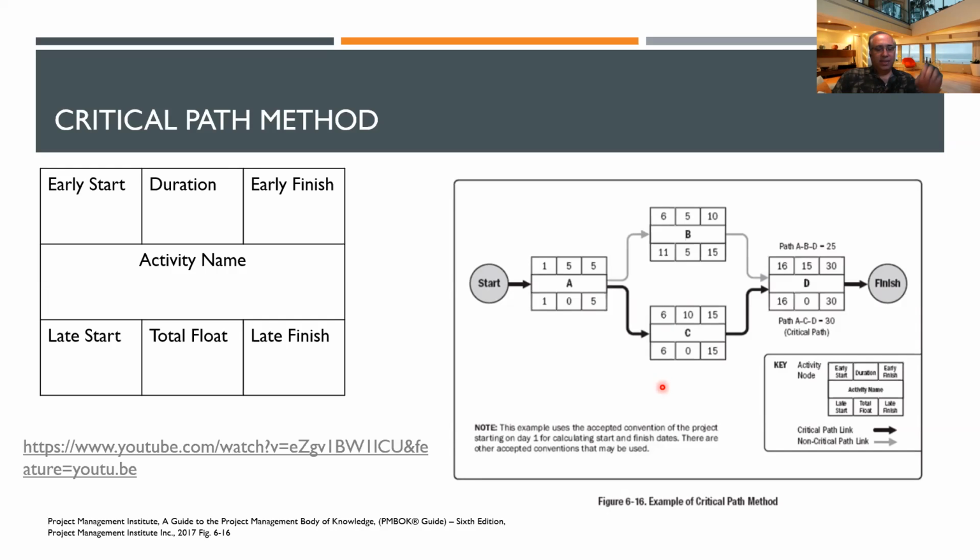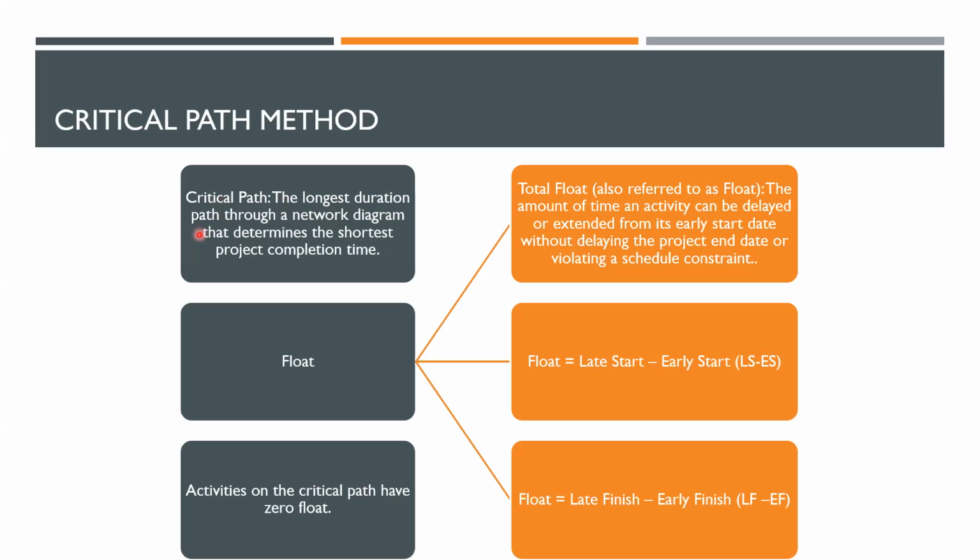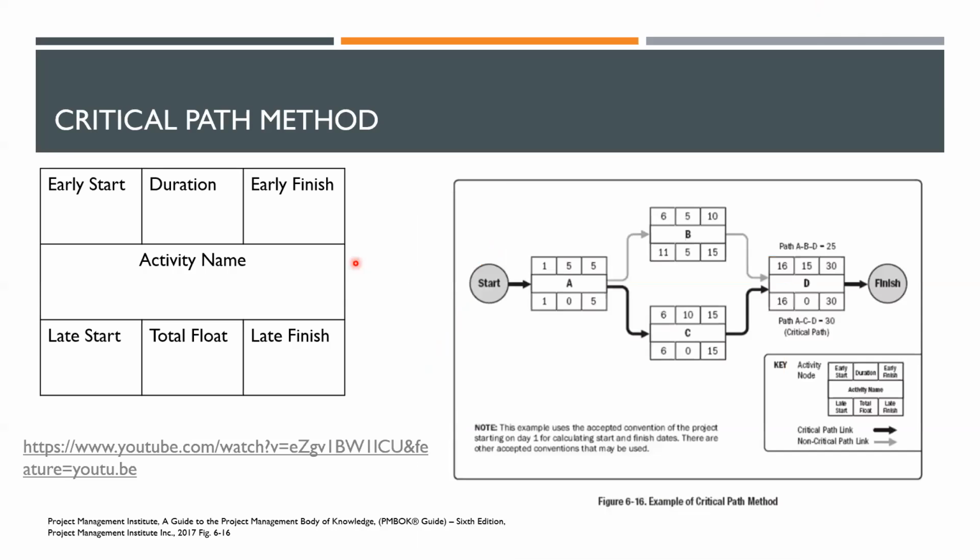And that is the concept of the critical path. The longest duration is the 1 hour 15, the longest that the person is going to spend eating, and that is the shortest time you can be in the restaurant. If that person finishes in 1 hour, then you can leave in 1 hour. Or if that person finishes in 1 hour 15 minutes, then you will have to leave at 1 hour 15 minutes, right? Yes, this is the concept of the critical path. This is a very simple one.